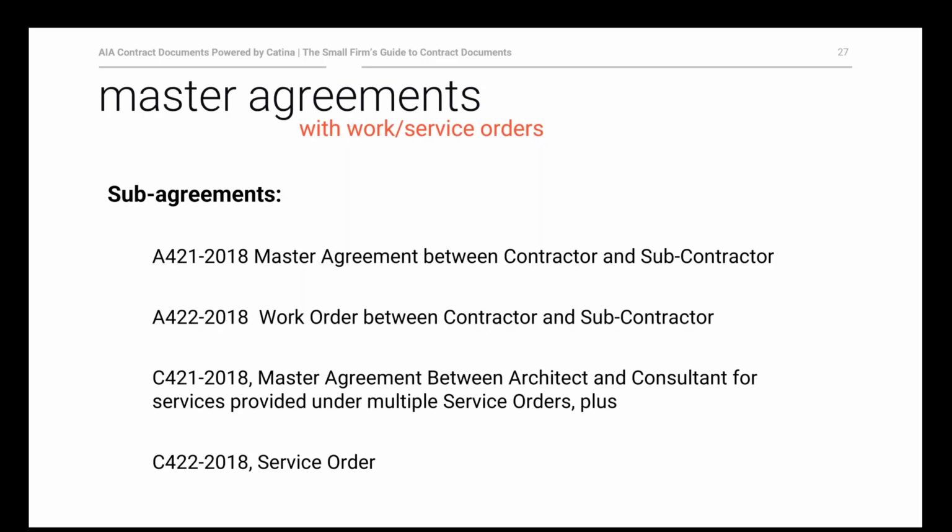And then each time you want to engage us to do design work or whatever, we can simply enter into a work order that will be governed by the terms of the master agreement, and it'll simplify and quicken our ability to get through the contracting phase of these engagements and get right to the work. And so there are a number of them that work, and these have been fairly popular documents.